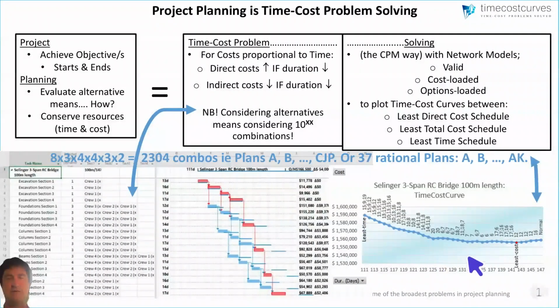So in between those two limits, being a concave shape, you have an optimized time schedule, and that is the least cost schedule. So that is, I guess, what rationally, if you didn't consider any other factors, you would aim for. That is the project duration which gives you the least cost that you need to outlay.